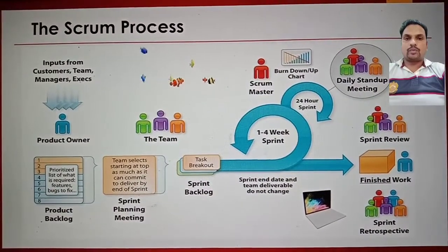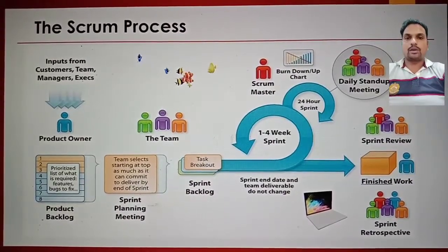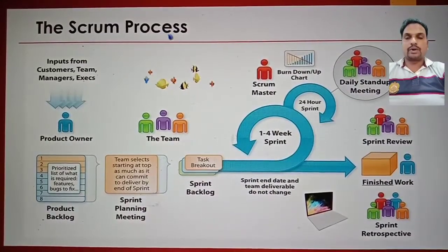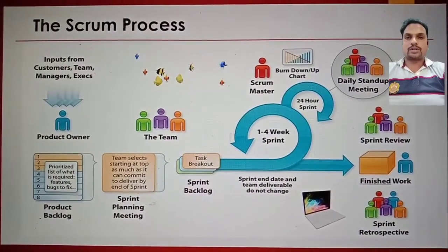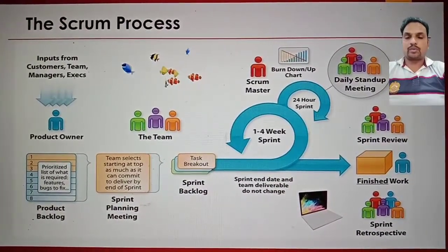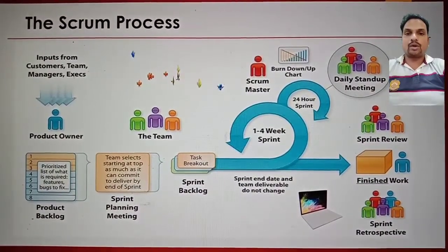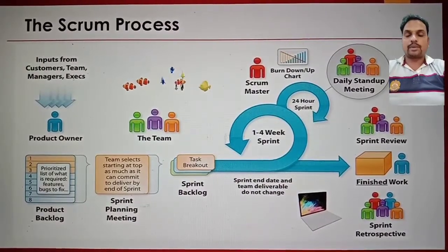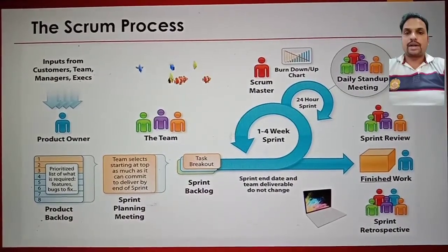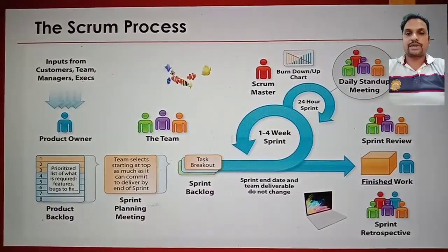In addition to the framework, we need to consider a few more details in the Scrum process. If you are looking at the product backlog, you have to consider bugs as well along with your wish list. While executing your sprint, if your user story is a big one, you have to break it into parts. That could be multiple tasks under one story. Then at the end of your sprint, or in between also, you can use burn down and burn up charts to check the status, so that you identify the real status of your sprint and the delivery status.